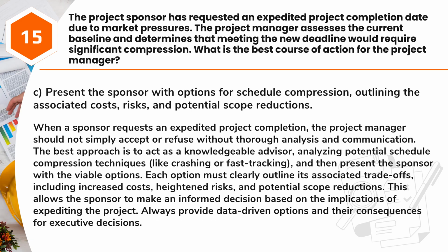Answer: C. Present the sponsor with options for schedule compression, outlining the associated costs, risks, and potential scope reductions. When a sponsor requests an expedited project completion, the project manager should not simply accept or refuse without thorough analysis and communication. The best approach is to act as a knowledgeable advisor, analyzing potential schedule compression techniques, like crashing or fast-tracking, and then present the sponsor with the viable options.